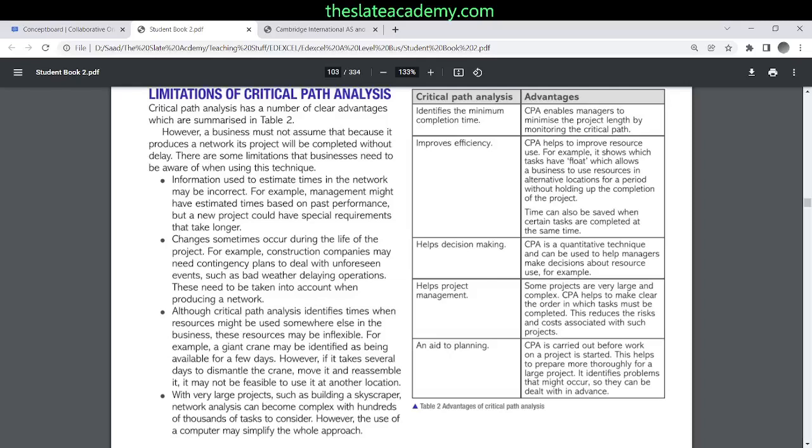If you know all the activities that need to be done, it would mean no activity gets left out, and resources for no activity get left out. You'd avoid situations where in the middle of the project you suddenly realize you are short of resources. You would realize which activities are critically important and cannot be delayed at all, and which activities can be delayed at times and by how much. So that would help you move resources around.